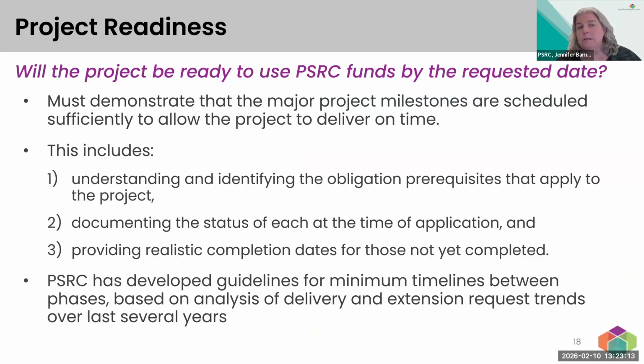Okay, project readiness. This is a big one. It's a big part of our review. And the question that we are trying to answer here is, will the project, to the best of everybody's knowledge, be ready to use PSRC funds by the requested date? So we have questions that are about the project schedule. And what we're looking for is a demonstration that the milestones of the project schedule are sufficient to allow the project to deliver on time.